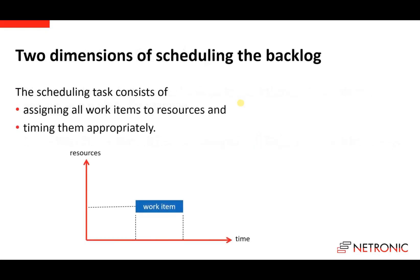When we schedule a backlog, the scheduling task consists of two different steps. First, we have to assign all work items to an appropriate resource, and then we have to time them appropriately. This means we have to find for each work item the proper position in the diagram with respect to its position in time and with respect to an appropriate resource.